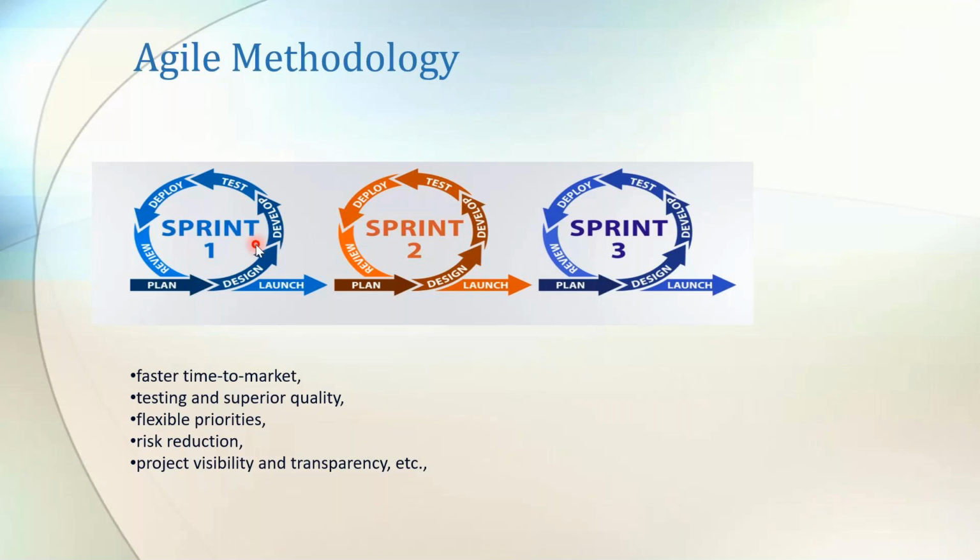So it's the same set of things I'm going to deliver, but if I have 10 features to be delivered in the waterfall model, I will club all 10 features together and do a deployment once in 3 months. But in the sprint concept, I will split the 10 features into two or three features for each sprint, and I will finish those two or three functionalities alone in the particular sprint, and I will deliver it.